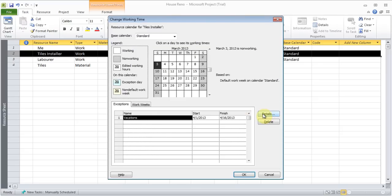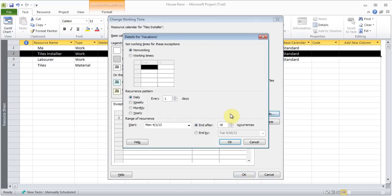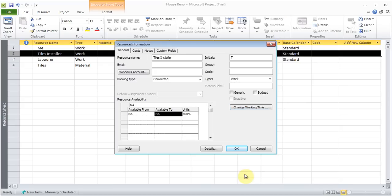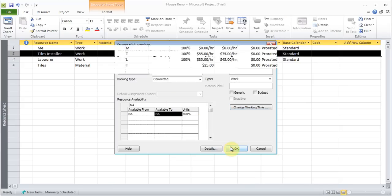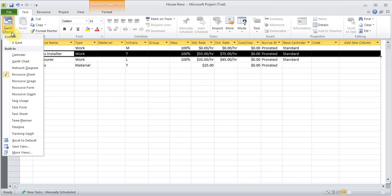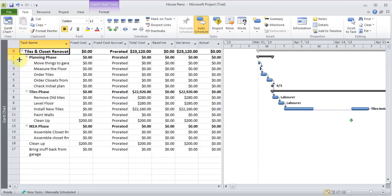Now I just want to make sure of the exceptions details. Non working. Just wanted to put that. Click okay. Click okay. Come back to the Gantt chart. Let's see if I've got something there. You see there. The vacation time has been split. The job got split. Into a couple of different days.